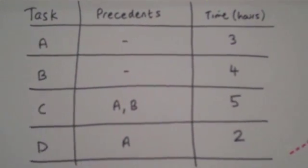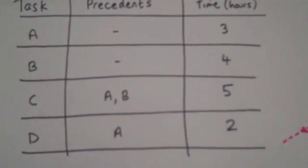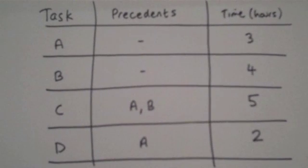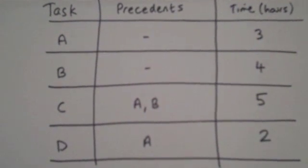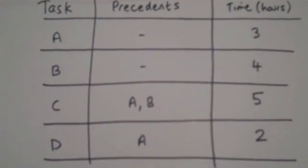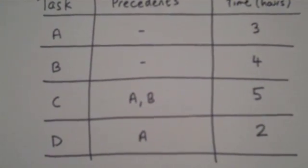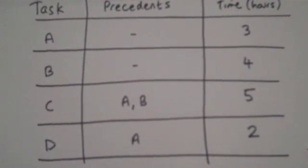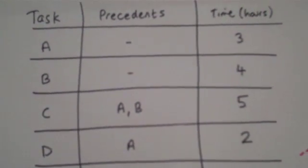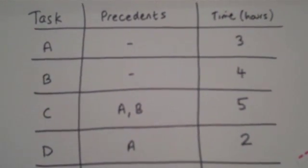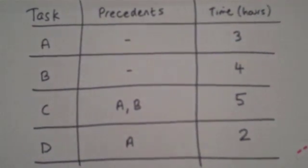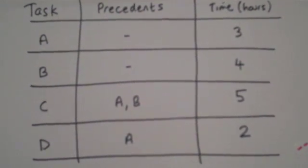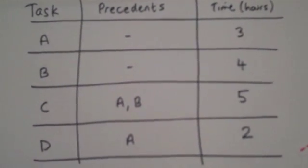We're going to do some critical path analysis. I've got four tasks: A, B, C, and D. A and B are my starting tasks. Task C requires both A and B to be finished first — these are called precedents. And task D requires A to be finished.